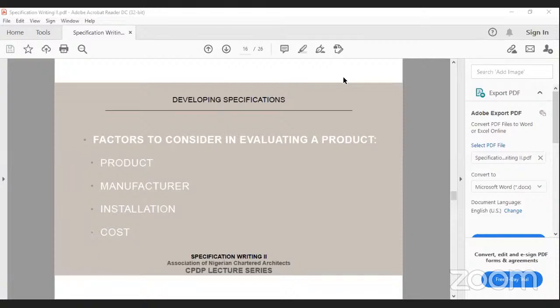So you tell your client who is on a very tight budget that the cheapest is terrazzo, and he gives you a go-ahead. You get the stones, and then you get an installer, and 2 months later, you break the floor off and want to cover it with tiles because it wasn't well made. So the fact that the material is cheap does not mean the installation is cheap.